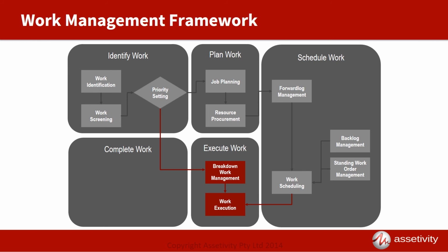The breakdown loop in particular is a serious issue since there's a strong tendency to drop everything when production stops and to rush to start work on the problem. But this can lead to poor safety and quality outcomes. It is always important to conduct enough planning and scheduling to ensure safety and effectiveness, even if it does cause a temporary efficiency hit.